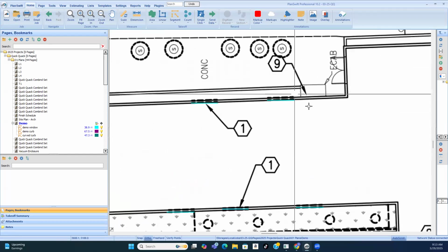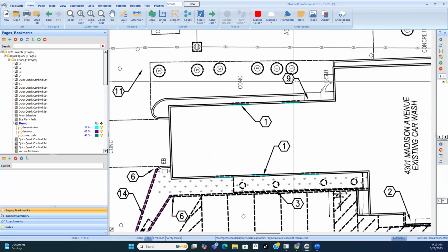But my main thing for starters is windows, square foot number. So you've got to figure out a way to know what the height of that window is. I was going to assume it was like the 4x4 window until I drove to the liquor store later today, and then I saw, oh no, those are 7 foot windows. I just happened to live in the neighborhood and know.